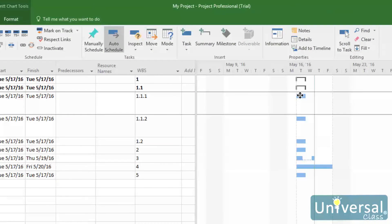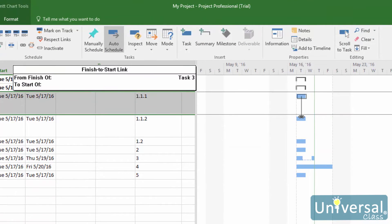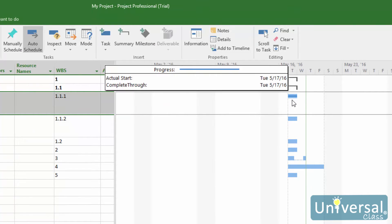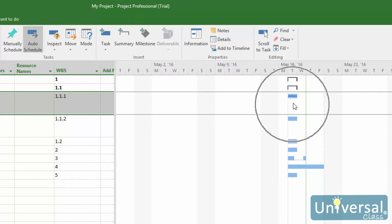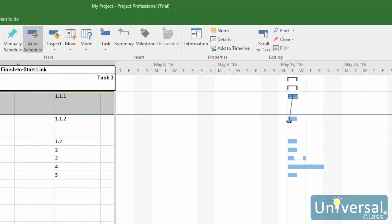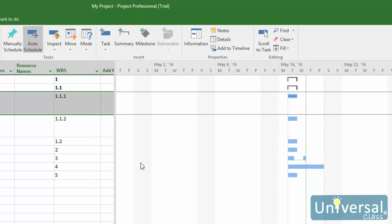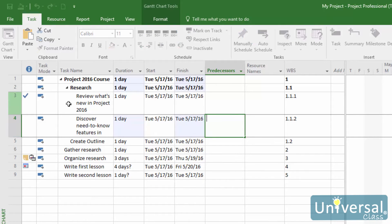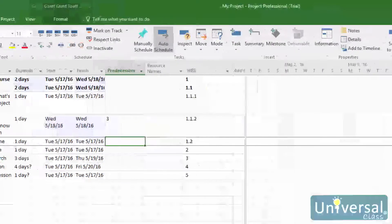Now let's try that again. Hold the control button, then click on the blue bar of the first task and drag it down to the second task. When you release the mouse button, the tasks should be linked and a new column called Predecessors should be displayed. If it doesn't appear, you can do this manually. In the Predecessors column for the successor task, enter the task ID for the predecessor task. In this case, we want task 4 to come after task 3, so if I type in task 3 and press Enter, the two tasks will be linked.